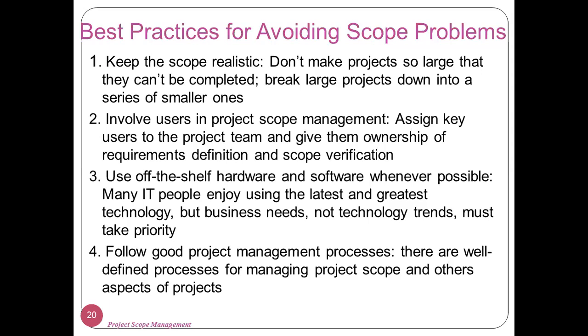Keep in mind that requirement definition is part of the start of the project, and scope verification is somehow the end of the project. So you should keep ownership with the user at the start and at the end of the project.